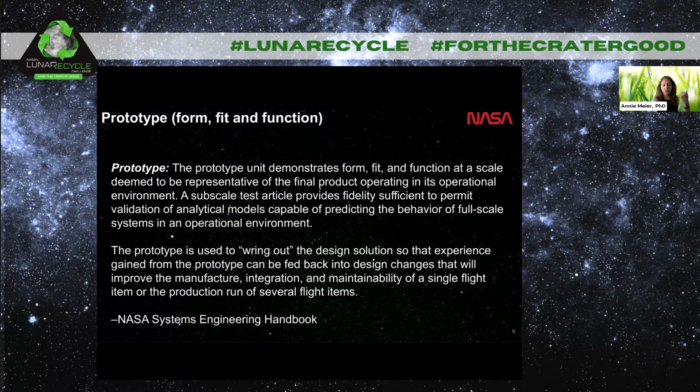Typically, we're attempting to buy off requirements along the way. So attempting to buy off a shall requirement on a prototype is not acceptable. It is usually completed on a qualification or a flight or more final controlled unit. So the point is you want to make your mistakes here, and you want to learn from them at the prototype unit, because your next units are usually what are going to qualify you for flight. So it's a really good learning phase.